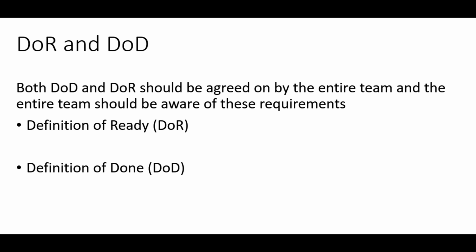The dependency between the story and dependent stories is reflected. How to test approach. All supporting documents needed for the work are attached or linked in the story. Please note that these items are common DOR items, but they are not the only ones. Each team should generate their own DOR list.